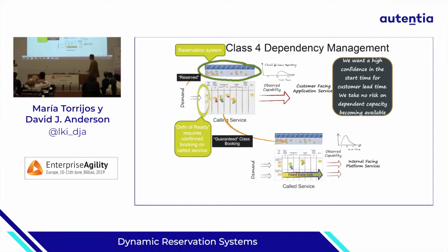And with that, we know that we're going to need to book guaranteed booking on our shared service, like a photographer, say in week 26. And we need that back pretty quickly because we have a service level agreement, some urgency associated with what we're doing with the customer, maybe even a hard deadline.